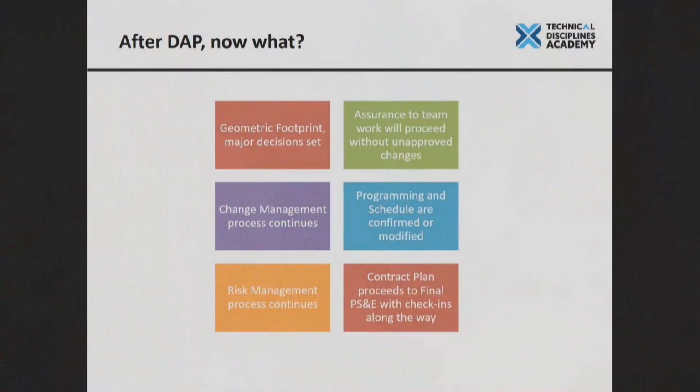You heard about the change management process. We do CMRs for budget, but we also do them for schedules. Let's say we get behind, some unanticipated thing happened on the project, so if we're going to significantly change the schedule, we might have to do a CMR for that. So we want to make sure that we're following our schedule and we're getting those done.